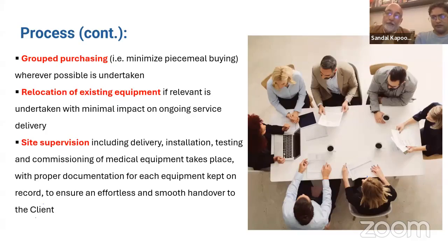How do they come? How are they reached? The logistics of entering the complex, and testing, commissioning, calibration, and operations. All these things take time, and there are regulatory and other compliances which have to be taken care of.